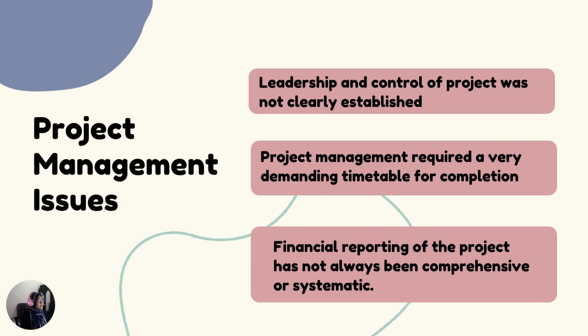Now we'll take a look at project management issues. Firstly, there were problems in ensuring clear leadership and control on the part of the client's organization. The construction manager also consistently sought to achieve the required early target completion dates, although it was unachievable. This is mainly because of the client's desire for the best achievable completion dates, but there was non-productive and out-of-sequence working that exacerbated the delay.